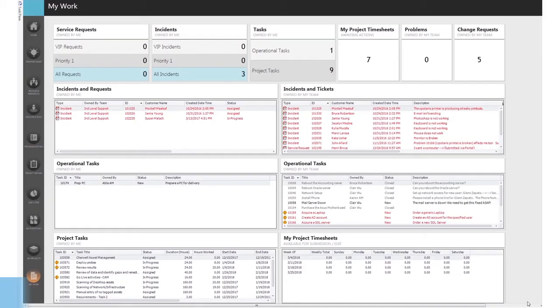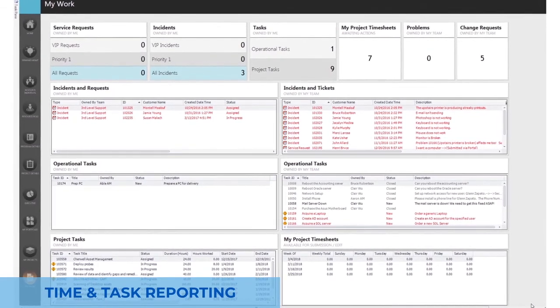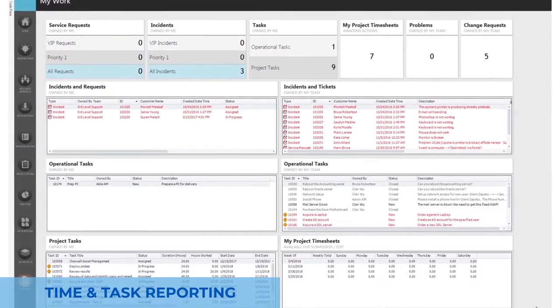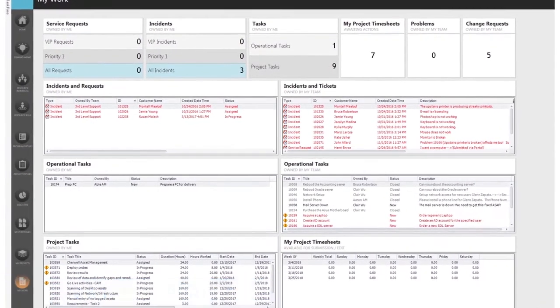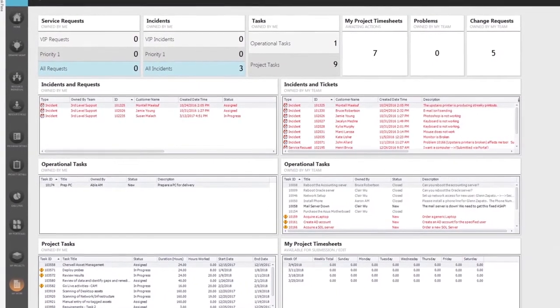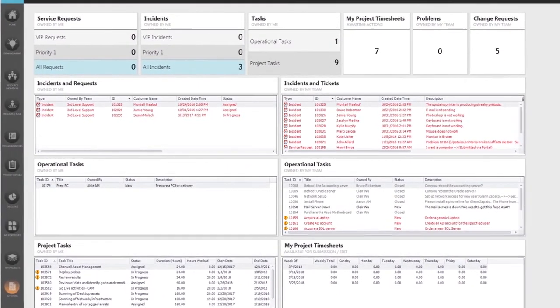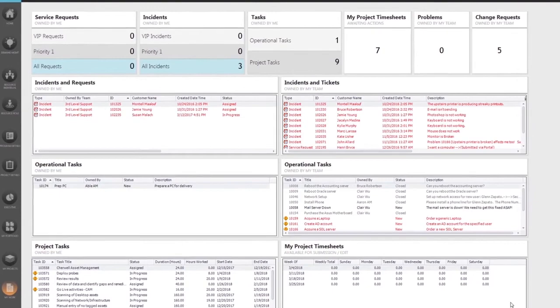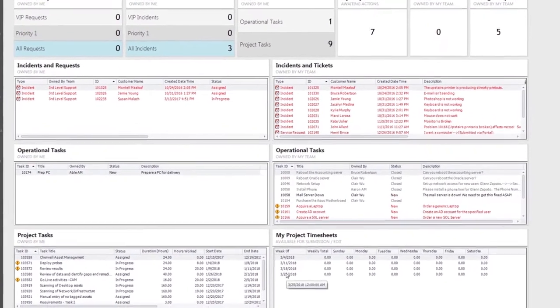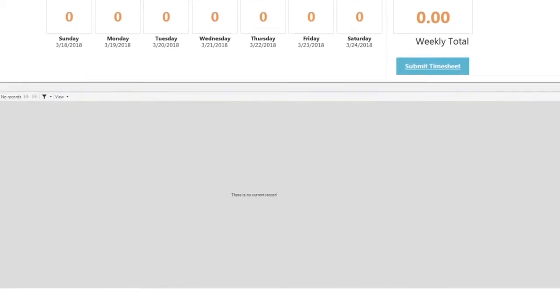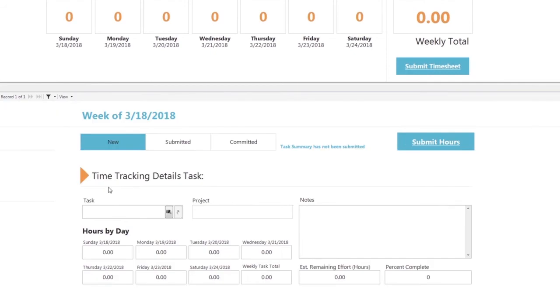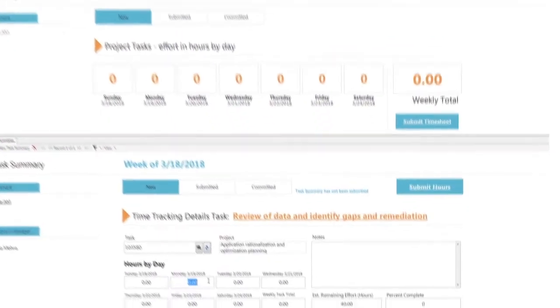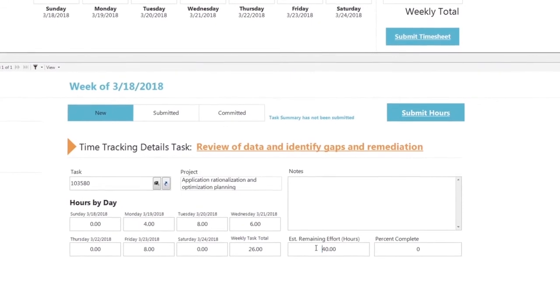Time and task reporting is very important to understanding planned versus actual effort. Project resources across the organization receive their project work on the same dashboard as other work in our ITSM solution. They can also track open timesheets and report effort against specific project tasks assigned to them, rolling up to specific projects, and updating key status indicators for the project managers.